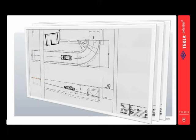And in the case especially of when you've got complex structures. Now, if you've got a very basic design, if it's completely rectilinear, it's not so difficult to do with a ruler and fairly simple quantity takeoff tools from paper. But when you've got things like curving elements, when you can't get true length lines from your drawings that easily, like a curving, say, wedge-shaped wall like you have here with a car park, which goes down to a cellar, that's a bit more of a challenge.